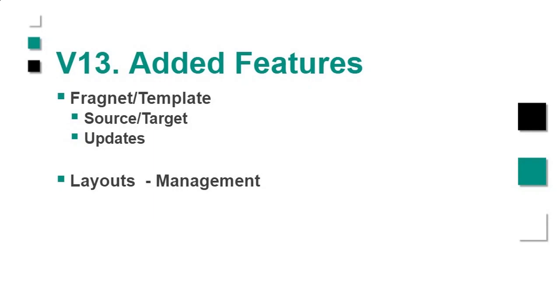I'll show you the source, the target, what you have to put in the Excel sheet. So it's very simple. This can be fantastic for loading in work orders if you're in a turnaround, or repetitive work if you're doing a capital project like a building, for example. So you have a repetitive template for different parts of the building. Usually the substructure has a template, and then the upper floors have templates.